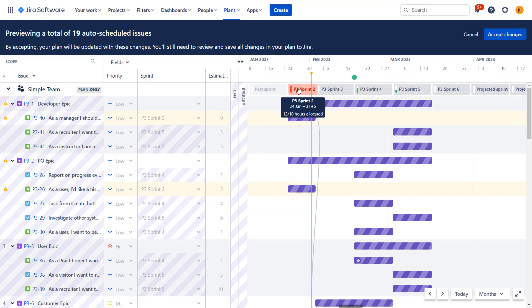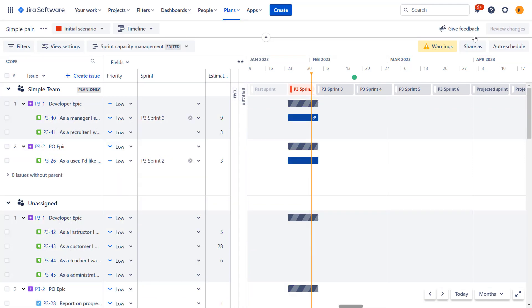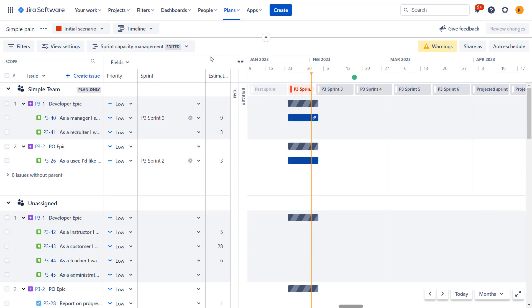This is an active sprint. So auto schedule does not move tasks in or out of it. This makes sense because this is sprint that we committed to already. This sprint we're working on and changing the scope is pretty drastic thing. So this is not something auto schedule does for you. Okay. Let's return to our initial plan.